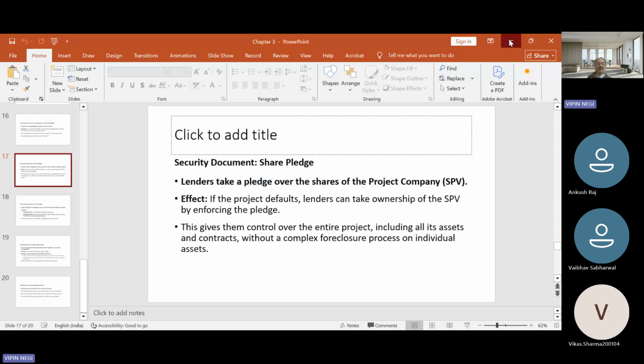Then withdrawals from these accounts are permitted on the basis of an approved major project implementation plan that is predetermined by project lenders on the basis of the project's status certification regarding the achievement of various yardsticks and milestones agreed upon at the outset. And such a mechanism is considered to be of paramount value to the project lenders for ensuring end use of funds and monitoring project implementation.